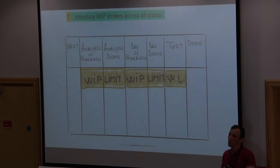Why is that important? Well, it is important because we want to build slack in the system. Remember we talked about flow. To achieve flow, we don't want to have 100% resource utilization. We want to optimize for flow. So it means that at any given time we want people to be free to look at the unexpected. So for instance, if I have three developers, as a rule of thumb, I like to create a WIP limit that only two would be busy at any given time. So one is always free, either to pair up or to look at to help with analysis or a tester and so on and so forth. So building slack is really important to achieve flow. Using WIP limits is one way to do that.